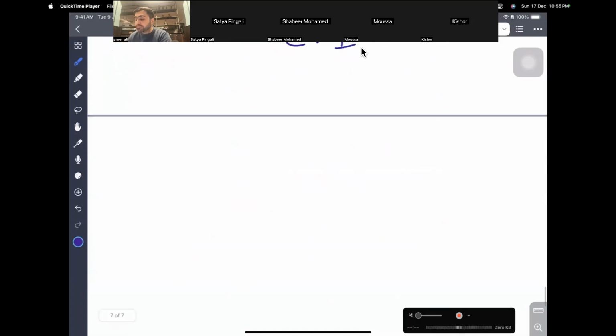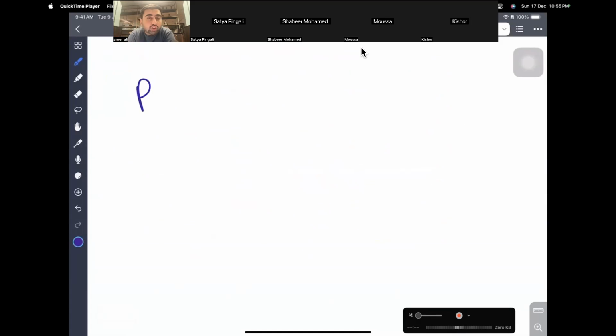Then in procurement, in plan procurement, we make a procurement management plan that talks about what strategy I'm going to follow, which type of contract I'm going to have. Is my scope fixed? I'm going to have a fixed price contract. Fixed price can have fixed price incentive fee, fixed price economic price adjustment. Which type of contract are you going to have? Once we have decided that I'm going to have a fixed price contract, or if you want a cost reimbursement, which can be incentive fee or award fee, or you want something on subscription, a time and material contract.